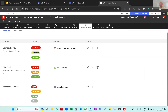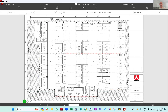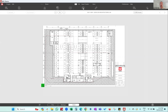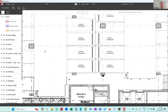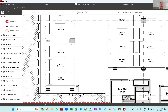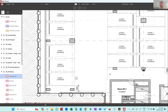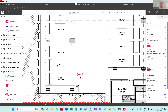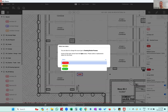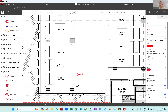Now let me show how to utilize this in Revisto. I'm in a drawing and I want to drop a stamp. I've identified a problem in a corner, so I'll select drawing review, drop a stamp there, and on the right-hand side I select the issue type 'drawing review' and set the status to 'for review.' That locks in the custom status into the drawing.